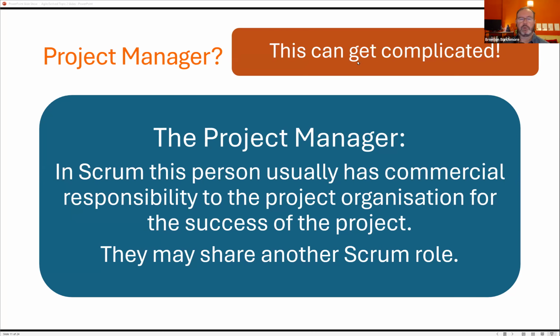One of the things you absolutely cannot do, should not ever do, is have the product owner and the Scrum Master the same person. That should never be the case. Can you have the Scrum Master, one member of the team, also producing stuff? Potentially in small organizations, I've seen that happen. I've seen it work and I've seen it struggle. But if you're not big enough and the project isn't big enough to afford its very own purely dedicated Scrum Master, then maybe they need to do something else, but not also product owner.